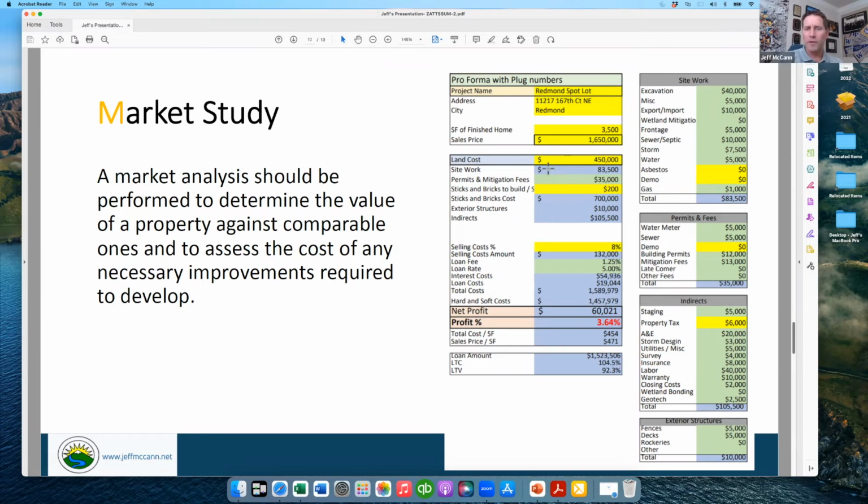But in order for the builder to break even at 1.8 million, the seller would actually have to give them the property for free, and write them a check for $25,000. And this is a property that the buyer had spent $290,000 to buy, and then another $100,000 in studies. So they were almost $400,000 into it.